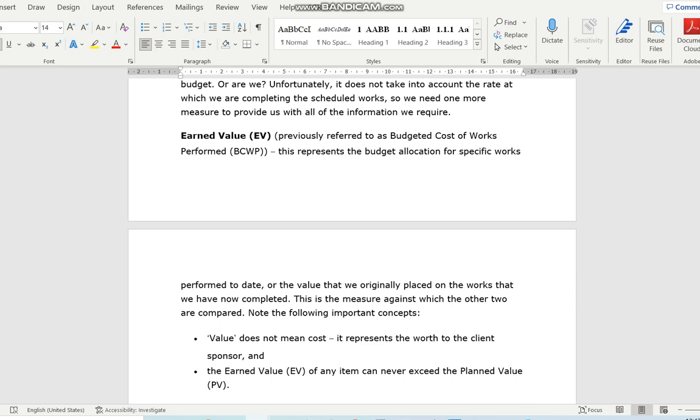If you go for the physical S curve, the percentage of progress, you can relate that directly. If you want to do it really quick, you can take the percentage performed that month, calculate back the total percentage of the project, and then with the cost, you can get your EV that way.